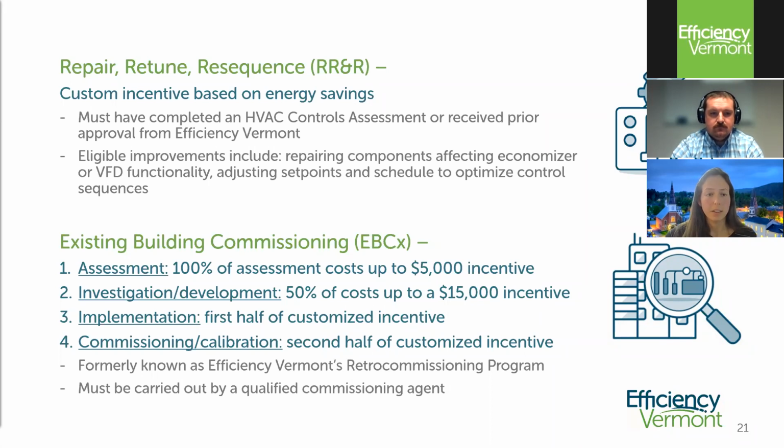Moving on to existing building commissioning, or EBCX, we used to refer to that as our retro-commissioning program. Springfield Hospital's project actually roughly followed that EBCX process, just for reference. The first step is the controls assessment that we talked about on the last slide. And that must be conducted by a qualified commissioning agent if you're doing an EBCX project.